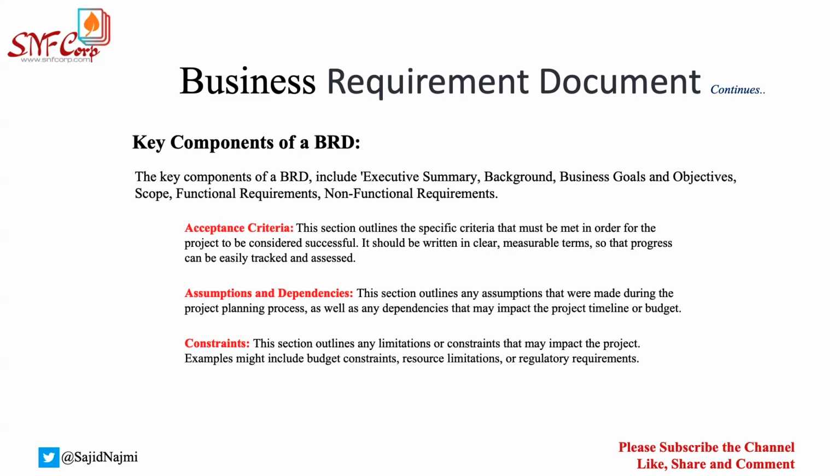And we may have some regulatory requirements. Let's say you are working on a software where you have seen a risk that some regulation is going to change from the government body in future. And that might also impact your project. And you may have to change some of the scope of the project just because of those regulatory requirements.